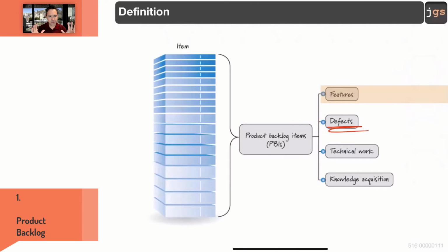Again, it is not mandatory. It is optional. Some people follow the template for everything. But if you follow the template to document a bug, a defect that needs to be fixed, that doesn't mean that thing, just because it's in the story template, is a requirement. It's a bug that you or your team found that needs to be fixed. Requirements come from the user. Fixing a bug is something internal to the team. And again, in the first iteration, you do not have that. You haven't started working. Anyway, defects. Moving forward.